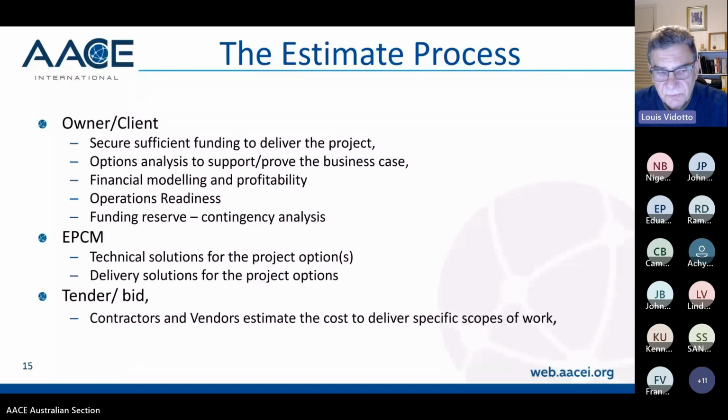So the estimating process is really a bit different for the different entities on a project, but the processes are the same. I've prepared bids for contractors. And again, building the estimate plan and doing the basis of estimate is something that we've done. And it's always helpful because sometimes you find in a lot of companies that the estimators work almost a little bit independent to the project managers and construction managers. So you get that misalignment between the estimate and the scope and the strategy. So again, going back to what the AACE and we promote: do your planning, do the estimate, then do the analysis of it.